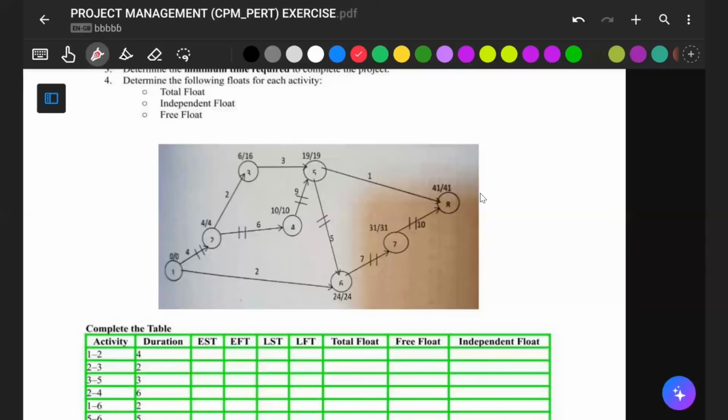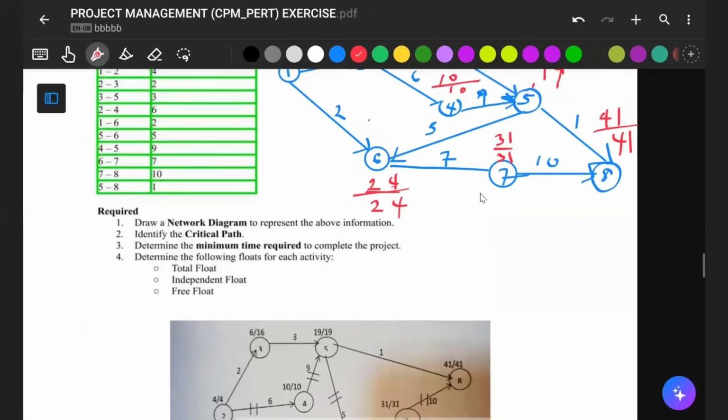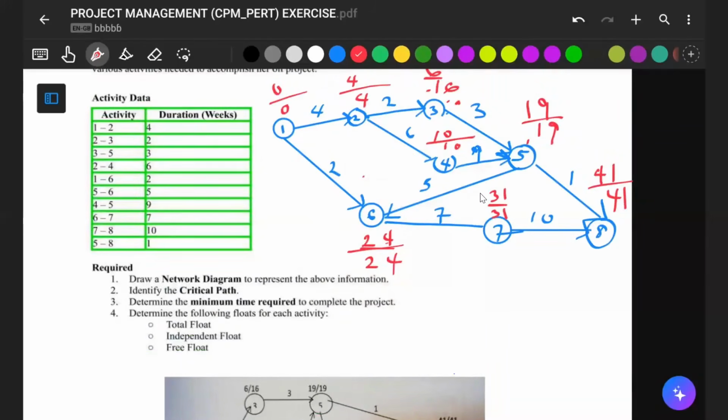Saturday anyway will determine what's going to happen on exam day. However, take note, always watch for activities that are coming out from a node. Once it is 2 or more, then you have to be very careful, especially when you are going back.